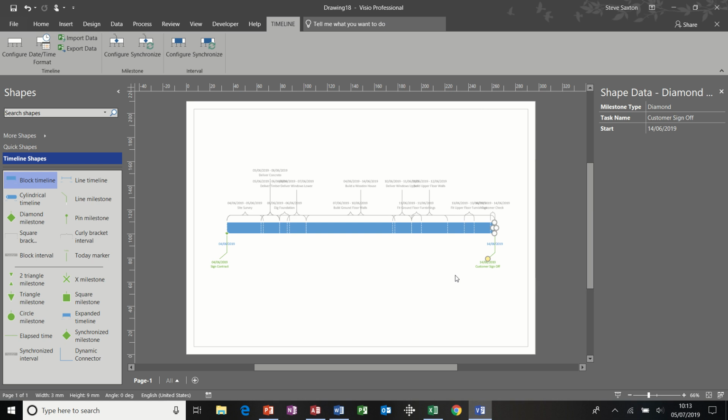Microsoft project file. Now you can see this is slightly cluttered, so you will have to edit this slightly, moving things around, moving the labels, but this is the information that is in the Microsoft project file. Now this information is not linked, so if the project file changes, this does not change, and you will have to change it manually or rerun the wizard.